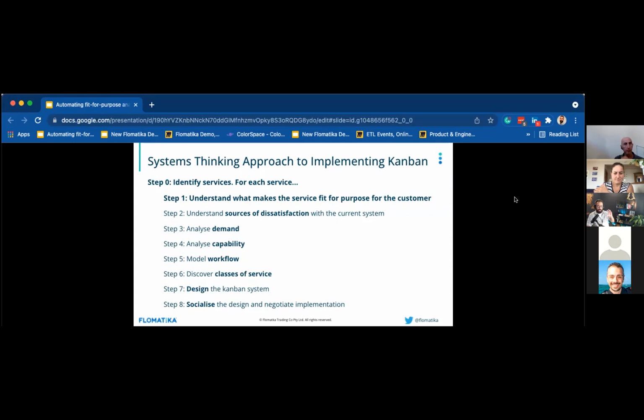So every time we identify a fitness criterion, in the singular, you usually need to understand what the thresholds for that are. If your customer cares about time to market or lead time, what is the threshold from which your service would be considered good enough, or satisfactory? So every time we have a criterion, we would understand the threshold below which you are considered not fit and above which you are considered fit.